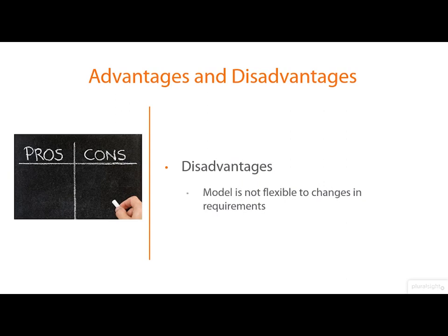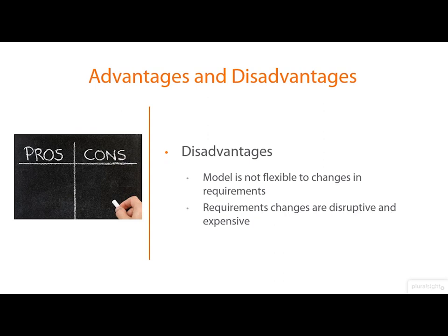Again, like with waterfall, the V-model is not flexible to changes in requirements. This means you will have to repeat phases in the model to make sure all your documentation is in place. A shift in requirements can be quite disruptive to a project, so you need to ensure the requirements are right from the start. In reality, this is never the case.